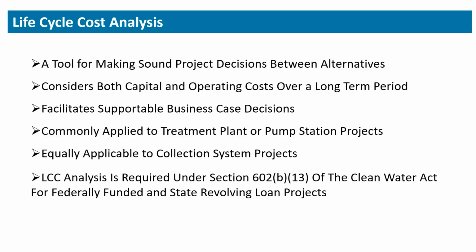So let's deal with the first question. What is a life cycle cost analysis? Well, it's a tool that can be used to help make sound decisions when you're weighing alternative approaches to getting a capital project accomplished. It needs to look not just at the upfront cost of getting the job accomplished, but the combination of the capital and the operating costs that will be incurred over the long term of the project's activity.